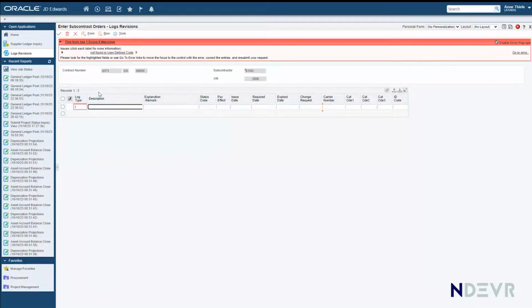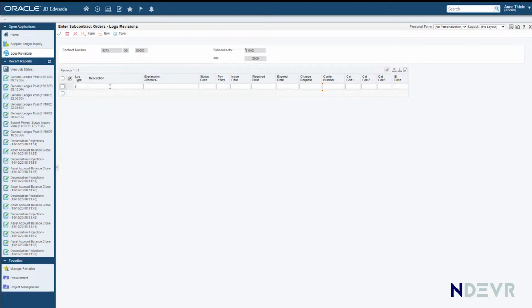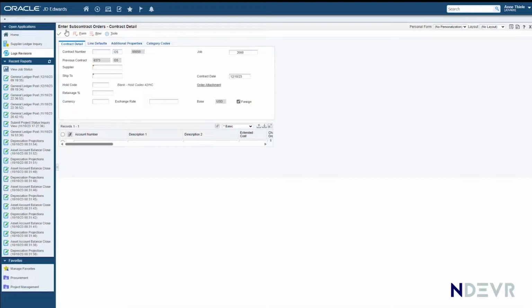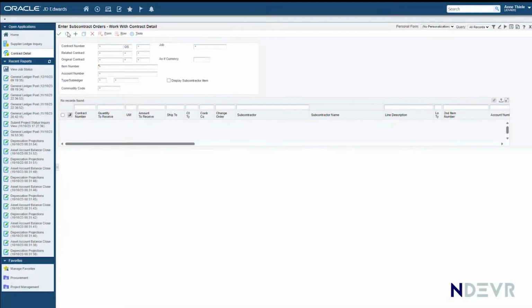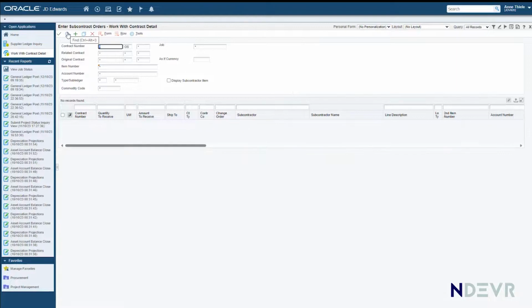I'm again going to add a submittal of a certificate of currency. And I'm going to say it hasn't been given to me yet. This one I'm maybe not worried about, and I need it by the 31st of the 10th. From a payment point of view, I'm not worried about it. Okay, and he's now been entered. 6373 is his number.